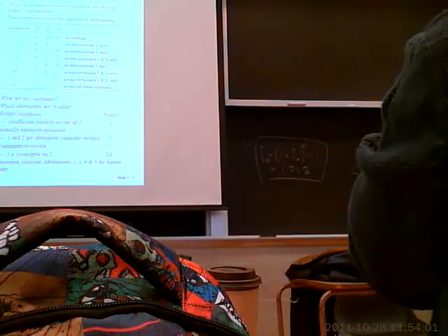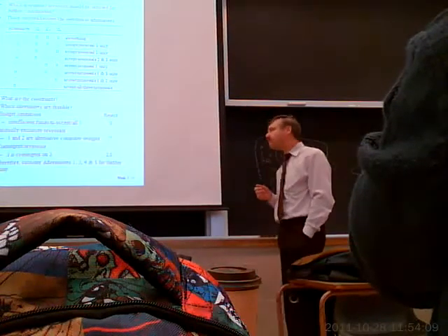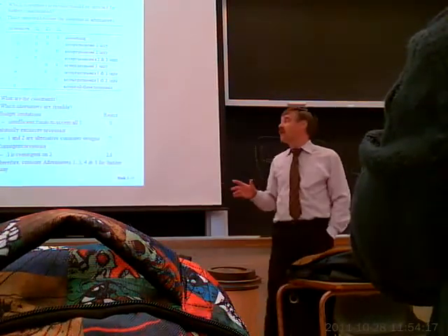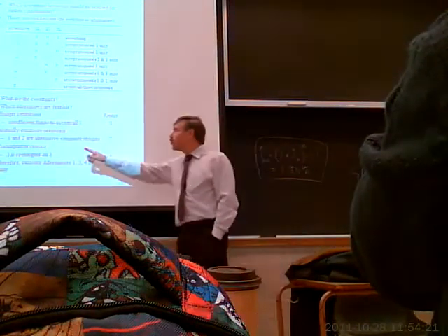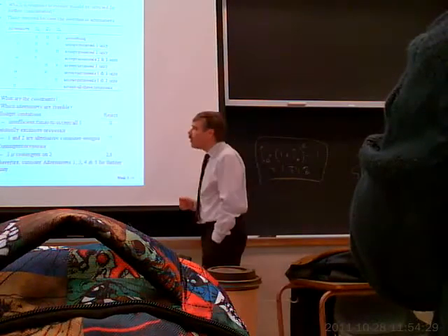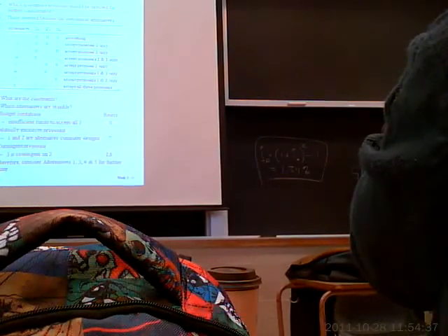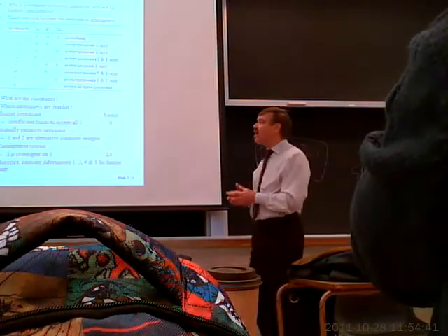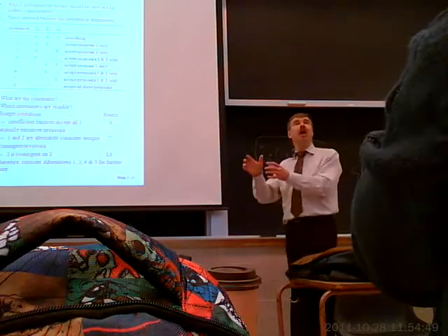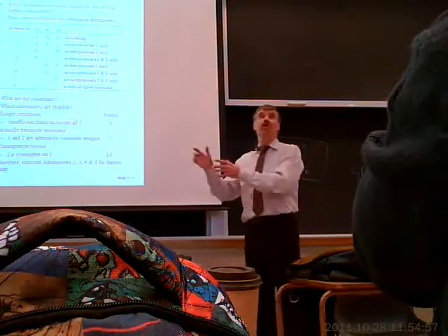Again, competing alternatives to do the same thing. Only need one. Alternatives that have both are not feasible or undesirable, so I can ignore those. And then finally, I've got proposals that are contingent. Contingency just means I need one before I can take the other. Let's say I've got 2 computer designs here, and again, these are mutually exclusive. So I've got competition from IBM and Cisco, let's say, for some networking equipment. And I have proposal 3, which is some feature that's only available on the IBM equipment. So if I have a network test and monitoring system that can only be used on IBM networking equipment, then of course I'm only going to evaluate that test equipment with the IBM proposal. So the test equipment is contingent on the IBM proposal, and therefore it doesn't make any sense measuring that with the Cisco proposal.